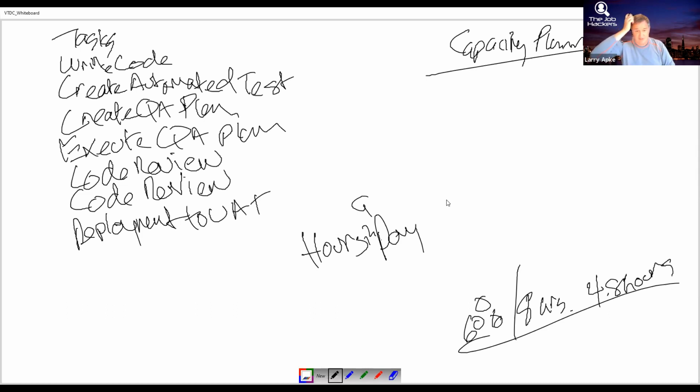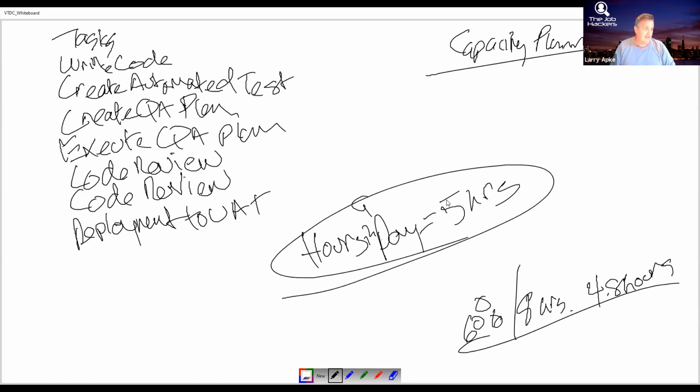What's the rest of the stuff? I don't know. Meetings, who knows? Trust falls, team building, I don't know. Right? So when I'm talking to teams, I say, you guys are a little bit better than average. We'll start with 5 hours in a day. I want to keep that in mind, because that's what we're going to use as our planning number. That's where we're going to start, by the way. So you got 5 hours in a day, each individual.